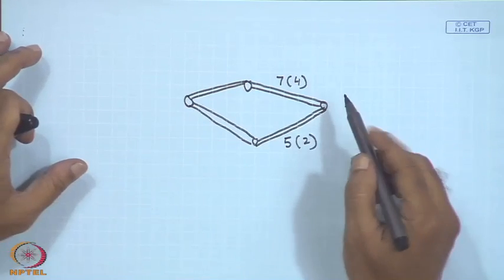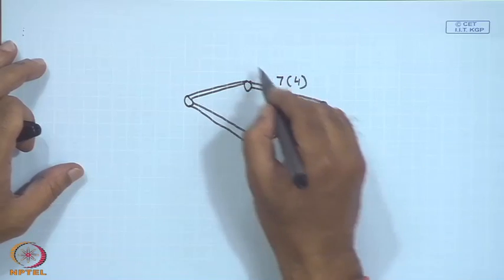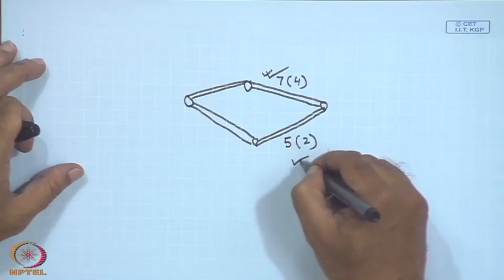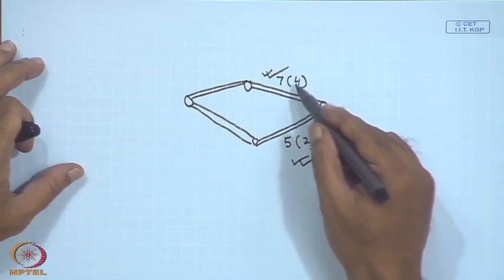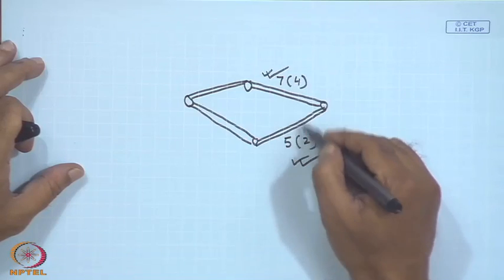So, whenever you are having two parallel critical paths, in that case if I want to crash this activity, its parallel activity also has to be crashed, because that means I can crash both these activities by 2, not more than 2, because the lowest of these 2 is 2.